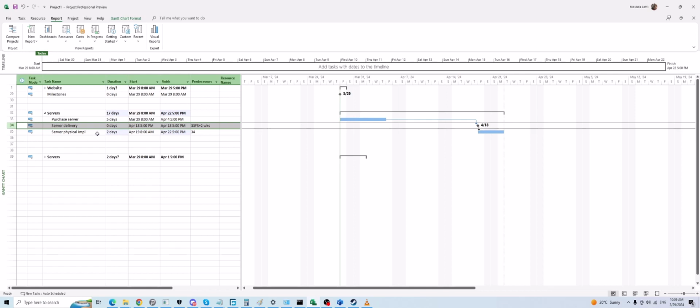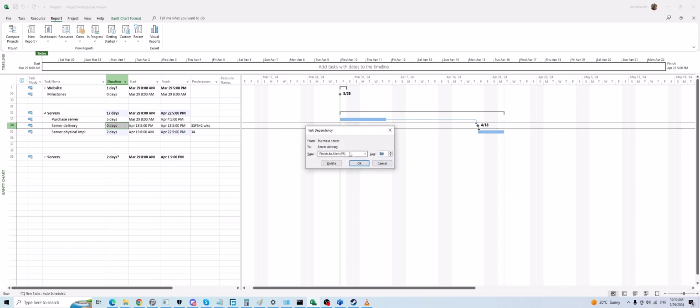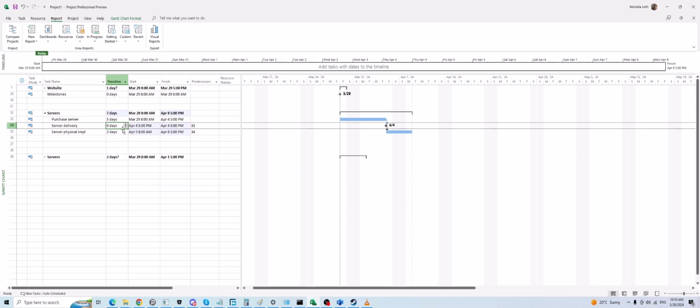So with milestone, I defined as a milestone task the server delivery inside of my project plan, and I will link it into my task so I have a realistic plan, and so I can track and monitor and control my project. Without these milestones, my plan is not realistic. And also I should not put, because I've seen many people working like this, I should not put it like this in my project.